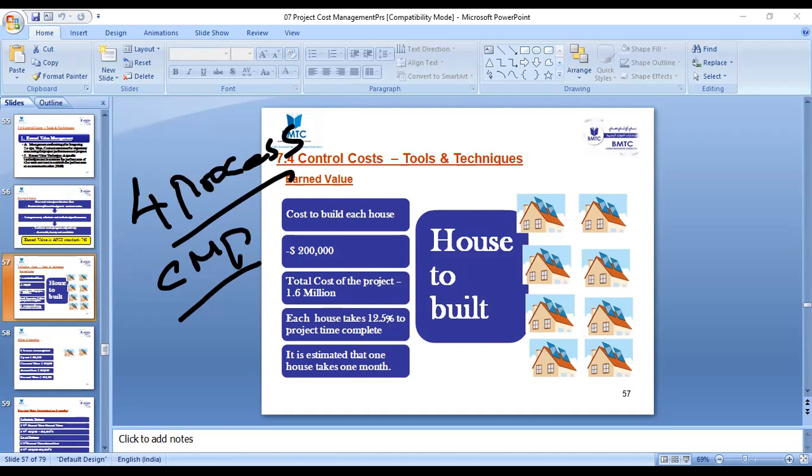So once you've taken the cost management plan, you will move to the next process. You will do the estimate cost process. So depending upon the organization where you work, you will be selecting your estimation methods. So if your organization needs an urgent estimation, what estimation technique will you use? They need an estimation within 4 hours. So what estimation method do you use? Analogous. What is the other name given for analogous? The other name given for analogous is top-down estimation, or we can call this a rough order of magnitude.